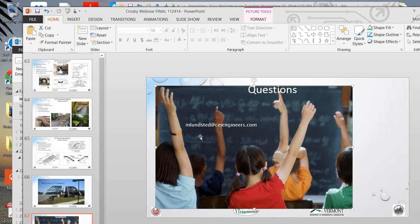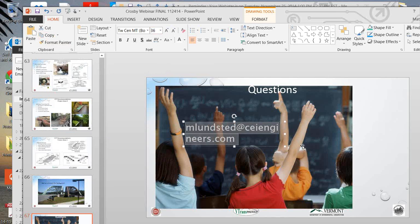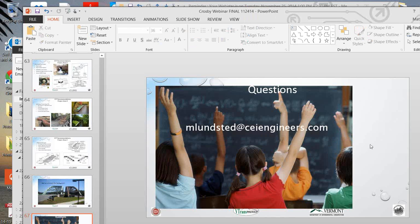Yes, we did. There's a cost component for the design, the site selection, preliminary engineering, site suitability analysis, permitting, and design. That is factored into the ranking, to the cost for each STP. We also evaluated each STP on feasibility more generally: what is an easier STP to maintain versus a harder one. That focused not just on the type, but also the location and how easy it would be to get to the site, and what other issues would be involved in maintaining this STP if it were behind in a wooded area where there's no access road, or even getting access on private property.